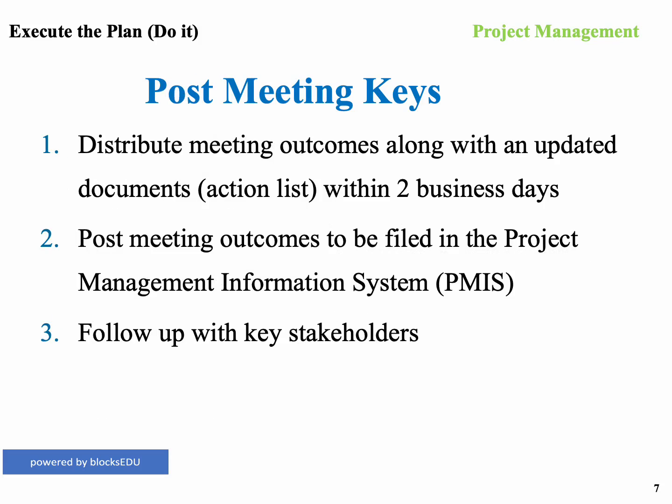Now, step 3 is after the meeting's done, here's some things you need to do. Distribute meeting outcomes along with updated documents, action list, within 2 business days after the conclusion of the meeting. Post-meeting outcomes, file it in your project management information system if you have that, or SharePoint, or wherever you store your documents. And then follow up with any key stakeholders that are there.